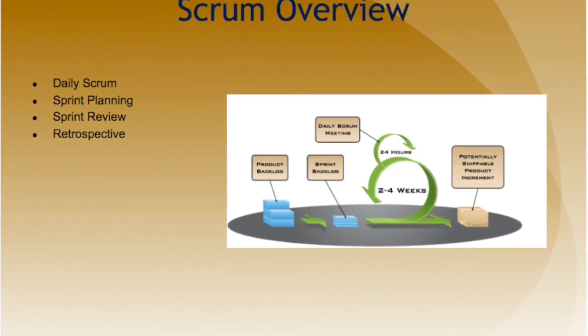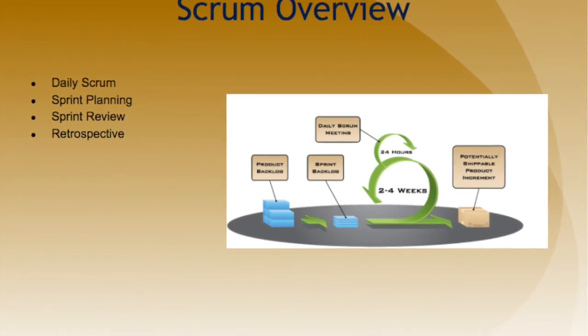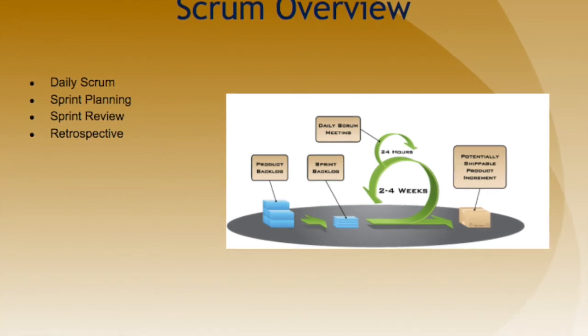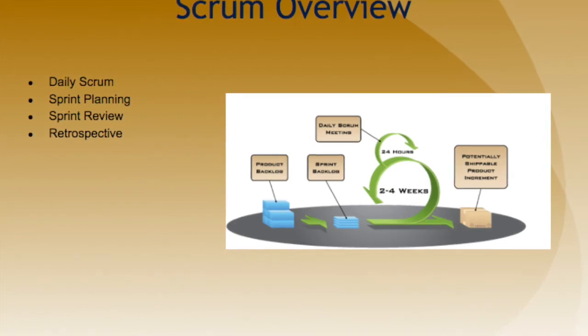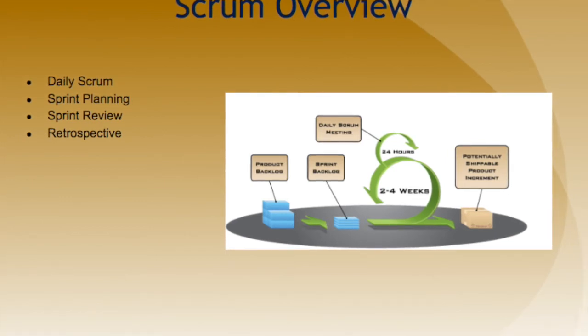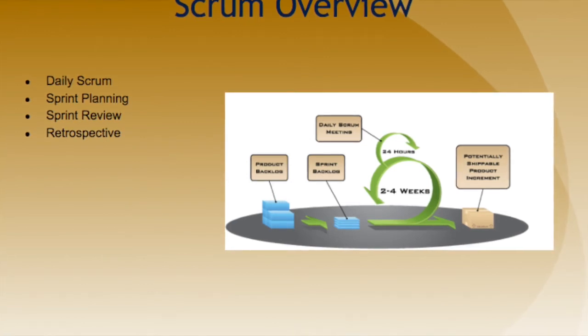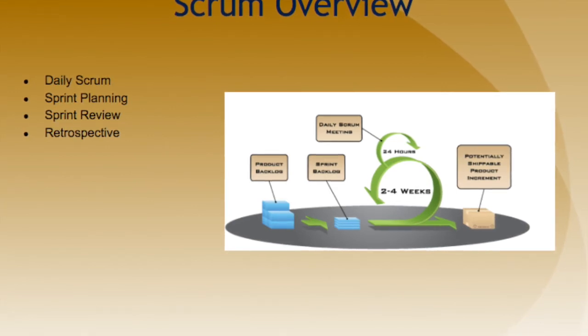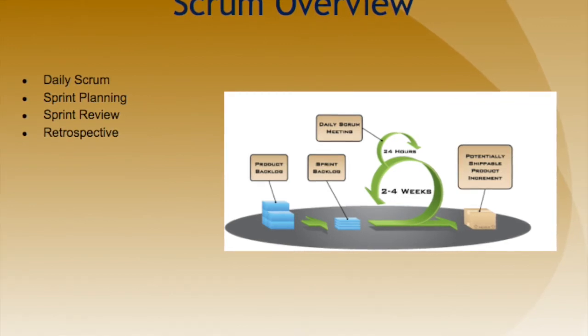In the sprint review, after each sprint, the team demonstrates the completed functionality at a sprint review meeting, during which the team shows what they accomplished during the sprint, and typically this takes the form of a demonstration of new features, but in an informal way. For example, PowerPoint slides are not allowed. The meeting must not become a task in itself nor a distraction from the process. This is very important.